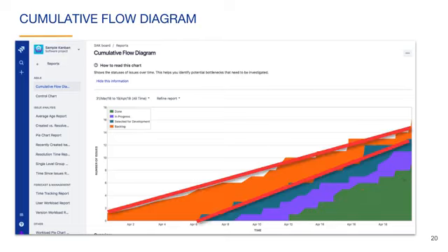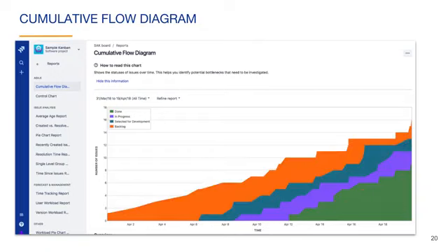You can see that the done band increases nicely over time, indicating pretty good flow. You can see that the backlog has almost been depleted, indicated by the shrinking orange band. You can see many important Kanban-related things from a cumulative flow diagram, including bottlenecks in the process, overall flow improvement, and how well the team is keeping up with the backlog. You can't really see individual issue problems with this diagram. You can use other reports or views to focus on specific issues.